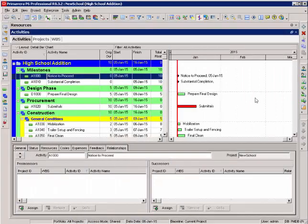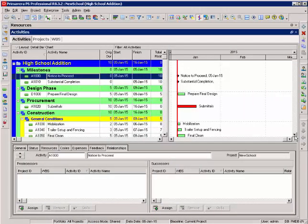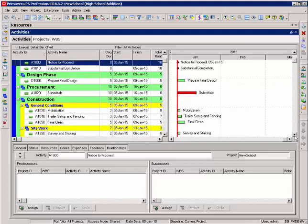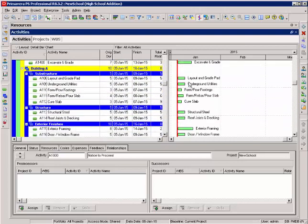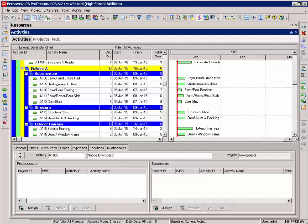Now let's start adding logic. There's three phases to adding logic in my schedules. The first phase is going down through the individual group of activities that I've inserted within my WBS and I build those as if they were individual schedules. That's one reason why I always keep small groups in my WBS. If I have more than 10 activities or so, I start looking at how to break my WBS out into another level and organize accordingly.